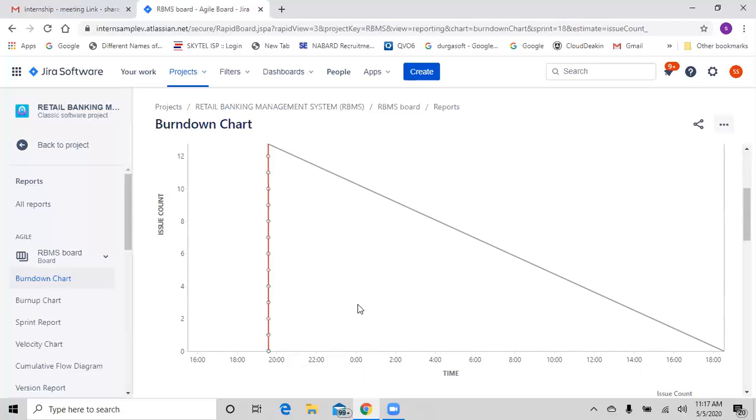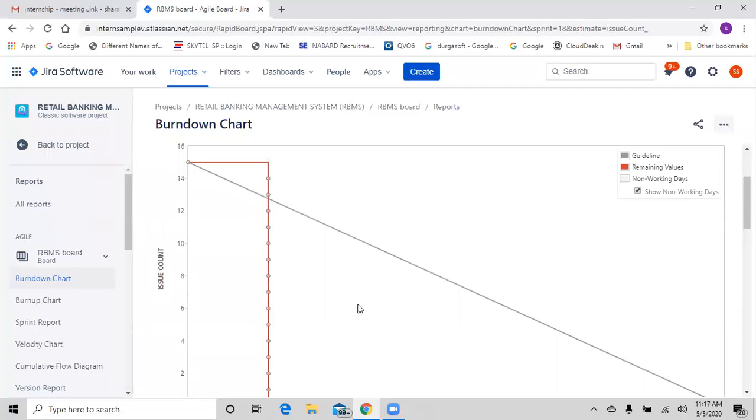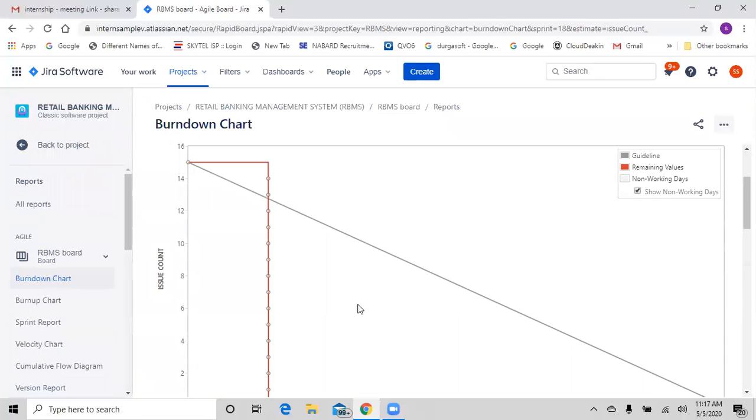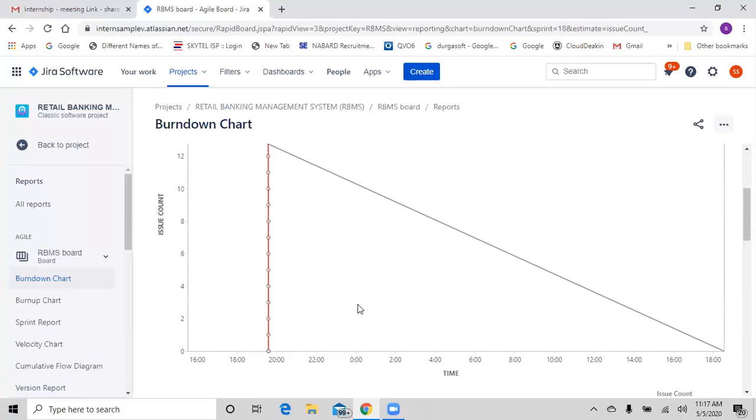If it is hardly 1-2 hours, it's not a problem. Even in real time, a gap of 1 or 2 days is not a problem, because if you plan 3 weeks and complete in 2.5 weeks, you will have hardly 1 or 2 days of idle time. At that moment, at least you can refine the product, and if there are any other user stories, you can map them as well. The chance is there. But if you plan 3 weeks and complete your work in the first week, ultimately you are manipulating the sprints, right or wrong? Correct. Okay, that should not happen. Simple.